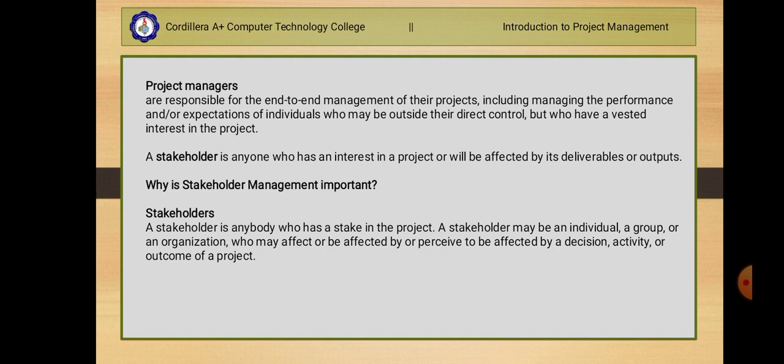Okay? So for example, let's say you are a project manager for a project that will enable a company to accept online sales orders via their website. So the stakeholders for this project are likely to be the head of sales, who is likely to be the project sponsor, the sales managers representing the internal end user group, the store or warehouse manager representing the internal end user group on the supply chain side, an IT manager who will provide system solutions for your project, and a group of customers who will represent the external end users. Okay? So that is an example.